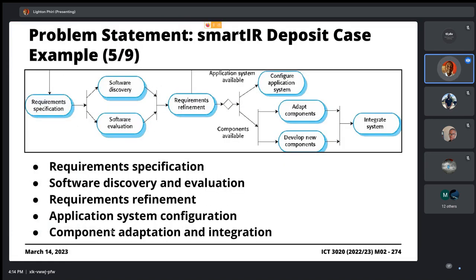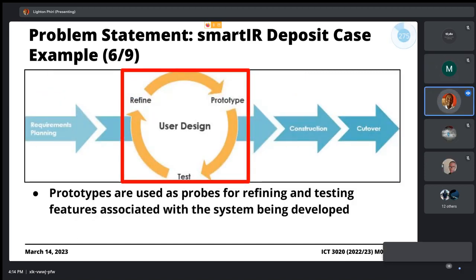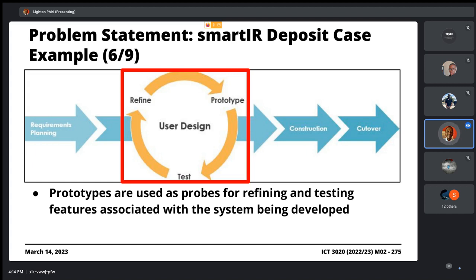This is one of the reasons why I was making mention of the fact that typically people say things like, oh, we're going to use rapid application development, RAD. Well, what people would expect to see are activities like requirements planning, construction, cutover. These must be explicitly included in the Gantt chart itself, right? Including these things that you iterate through, where the iteration takes place.